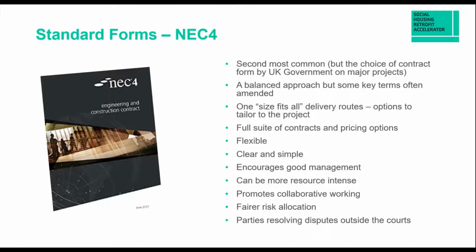It is, unlike the JCT, a one-size-fits-all delivery route, so it's not where the delivery model will be mirrored in the contracts. With NEC, it doesn't matter whether the contractor is expected to do any design or not. You would still use the ECC contract, which is the engineering and construction contract. So that would either be in the full form or the short form. NEC has a full suite of contracts.